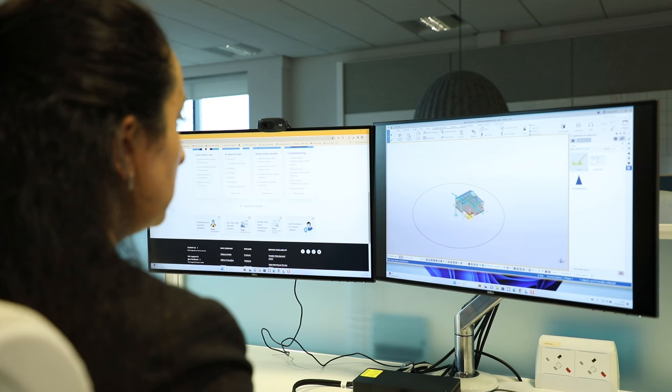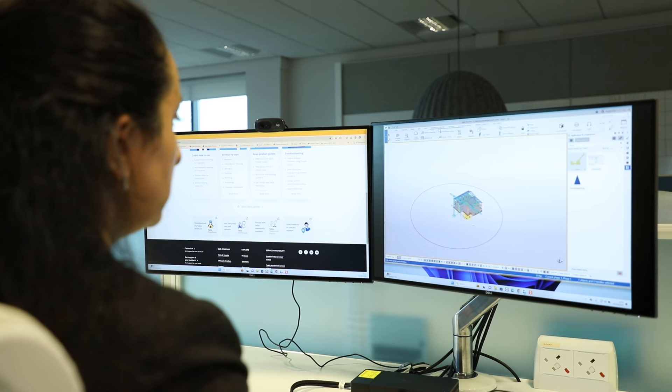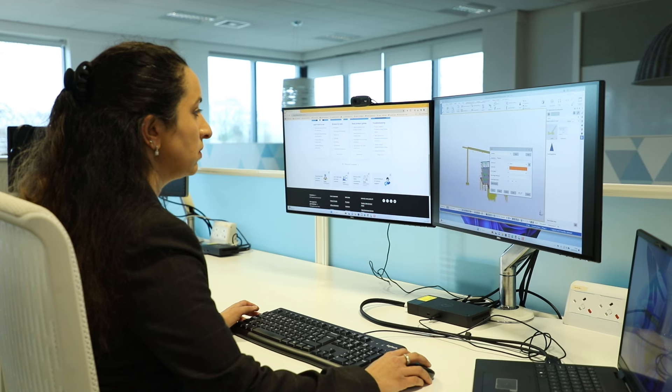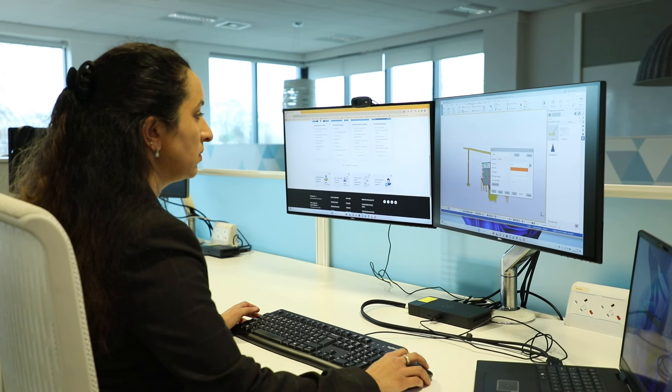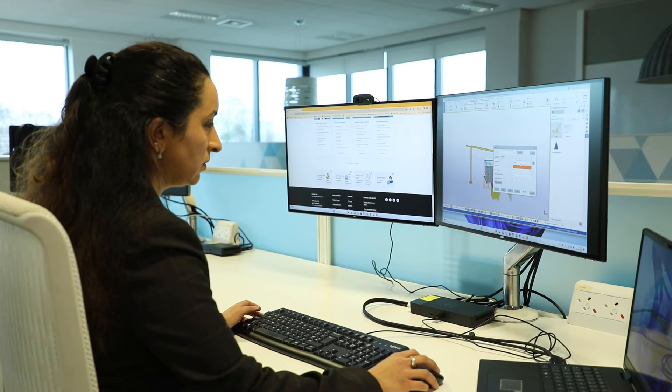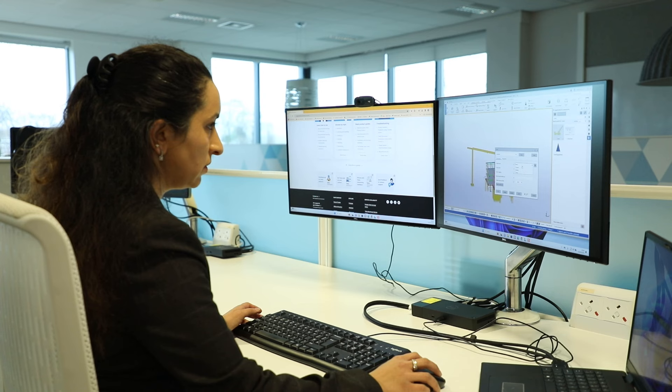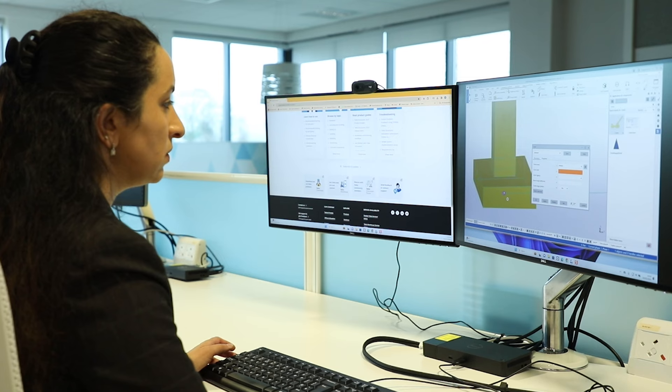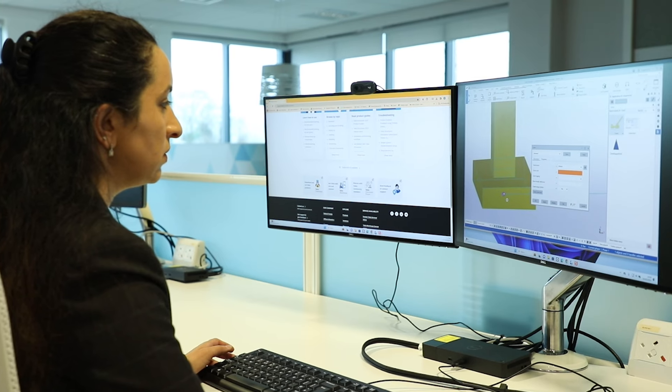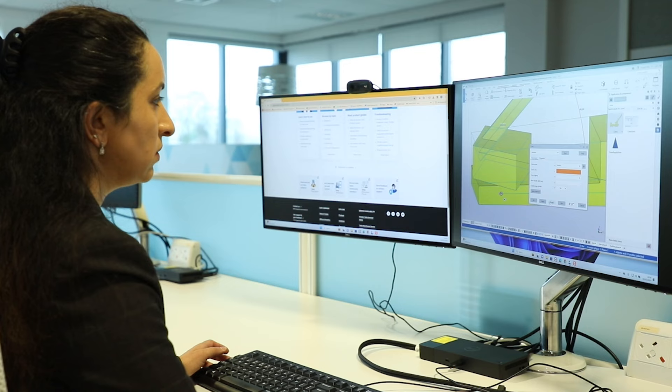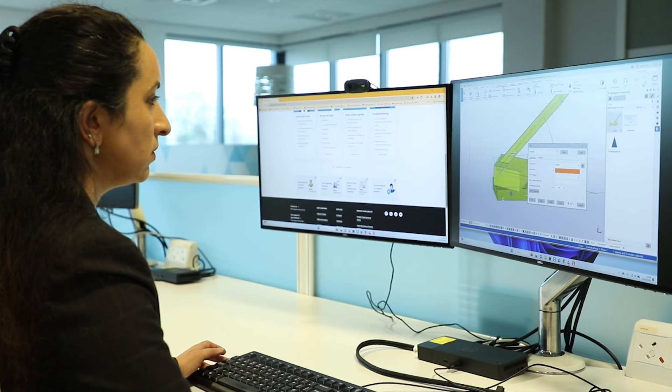So we see Tekla Structures using the project plan and execution stage quite extensively. With having the 3D model there, you can actually plan for things like lifting. So if you've got a really heavy object or a really awkward object that needs to be lifted, let's say it's in a city center area, then you're going to need a really solid lifting plan because you're going to have to have road closures, things like that. You're going to have to understand where your crane is. So you can put all that within the model and do kind of planning for lifting. We see a lot in offsite construction where you have sequences. So you can put your sequence in within Tekla as well and then do your planning from there.